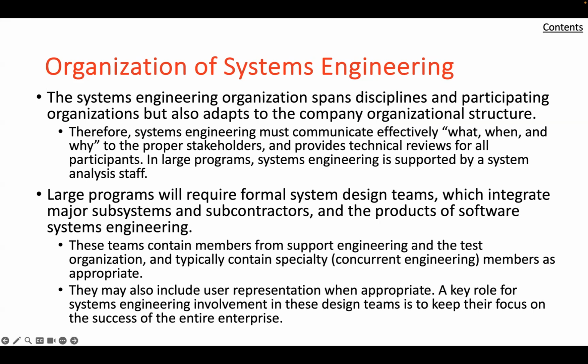There are several different means of communications, all of which need to be exercised as appropriate. One, all key participants need to know what they are expected to do, when and why. The what is expressed in the task statement and WBS. The when is contained in the schedule, milestones, and critical path networks. And the why should be answered in the requirements and specifications. A clear and complete statement of the why is essential to assure that the designers, analysts, and testers understand the objectives and constraints of the task assignments.